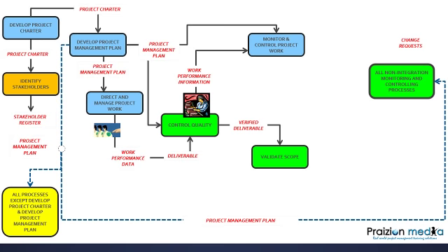was testing the kite. Another important relationship is from all of those non-integration monitoring and controlling processes, change requests is an output of all of them. And change requests are going to be processed in the perform integrated change control process. All change requests go here. In fact, think of it like this. There's only one process in the entire PMBOK guide that change requests is an input to. And the answer is perform integrated change control. Keep that in mind, okay?